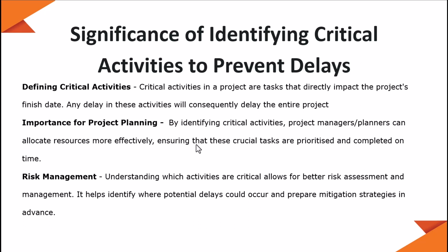If you're able to reduce the duration of the activities on the critical path, definitely your program will move to the left. But while you're adjusting the duration of the critical activities, look out for your near critical activities as well. Those are your activities with a smaller value of free float or total float. They might become critical.